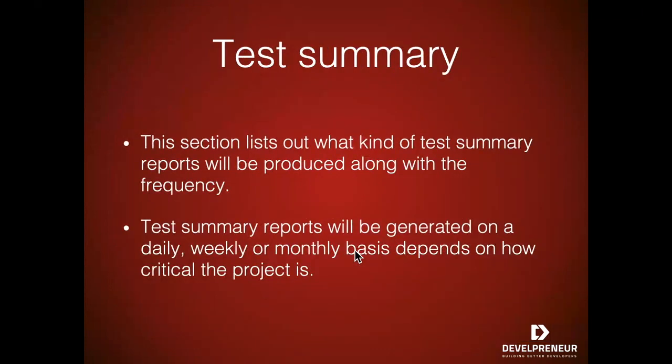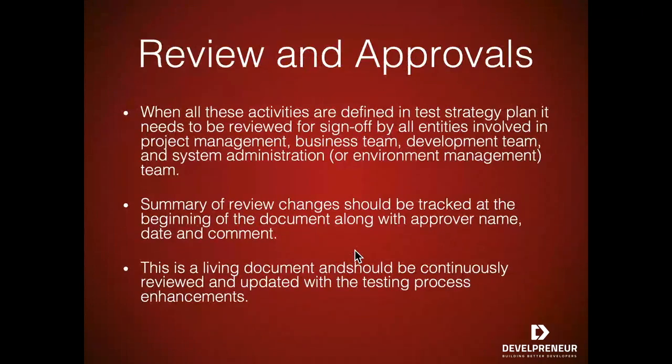Test summary. This section lists out what kind of test summary reports will be produced along with the frequency, and test summary reports will be generated on a daily, weekly, monthly basis depending upon how critical the project is.